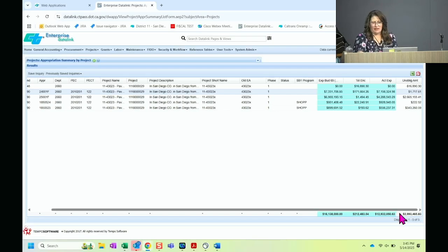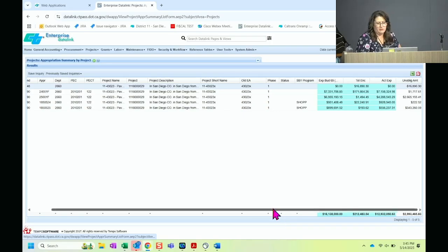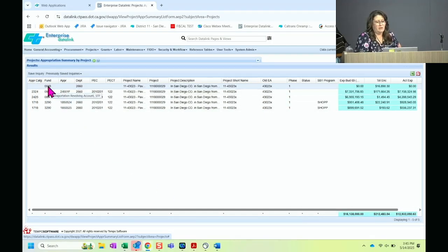They want to see bottom line. But if we do things right and we charge appropriately and we allocate appropriately, everything should balance out. But you'll see like line 1, I don't know what's going on with this first row, to be honest. This would be something that I would investigate because we should not have a fund called 0048. That's not a fund. That is a TRA account that somebody probably typed on an encumbrance as the wrong fund number. That probably needs to be corrected to hit the correct fund. These are things that we would be looking for and trying to analyze, right?